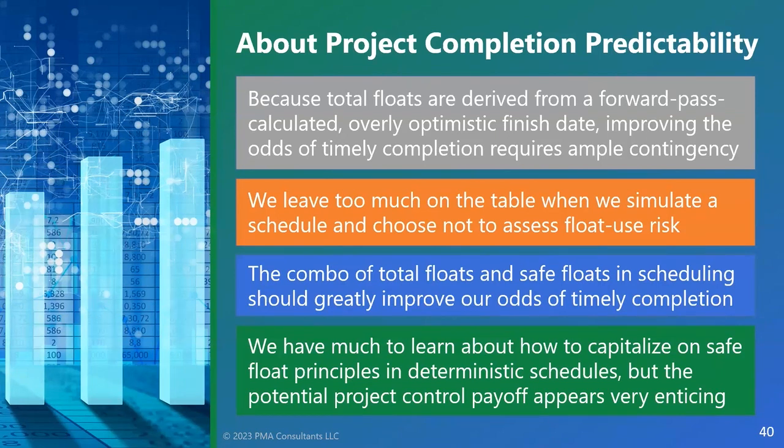Yeah, so considering Safe Float being similar to total float, but taking into consideration the uncertainty, well, in that case, yes, the orange activities were kind of like near critical, but near critical based on Safe Float rather than just the float available, the deterministic float. Right.